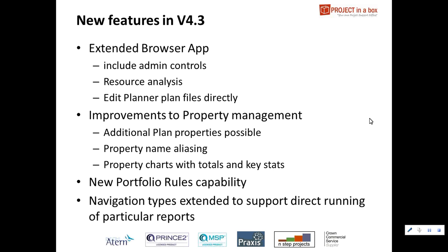longer than, ahead of or behind the baseline finish date. So you can look for those sorts of conditions now, or give me all the projects where the benefit value is less than the budgeted cost. So you can go away and pick from. Often customers are having 500-600 projects now. That's just too much data really to do it by eye.